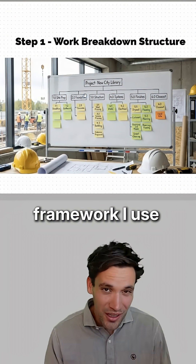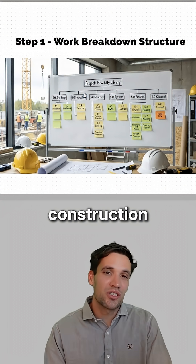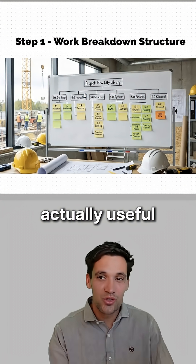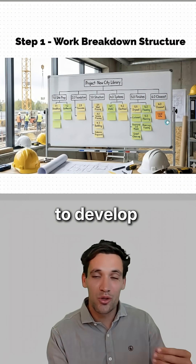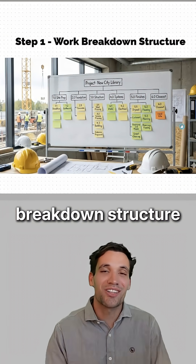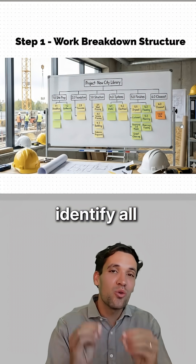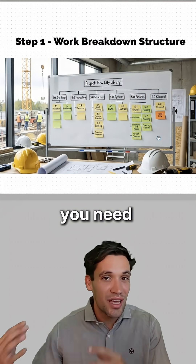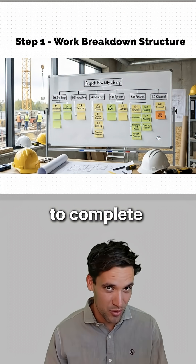So here's a simple framework I use to create construction schedules that are actually useful. Step one is to develop a work breakdown structure — identify all the tasks in a hierarchical structure that you need to complete to finish the project.